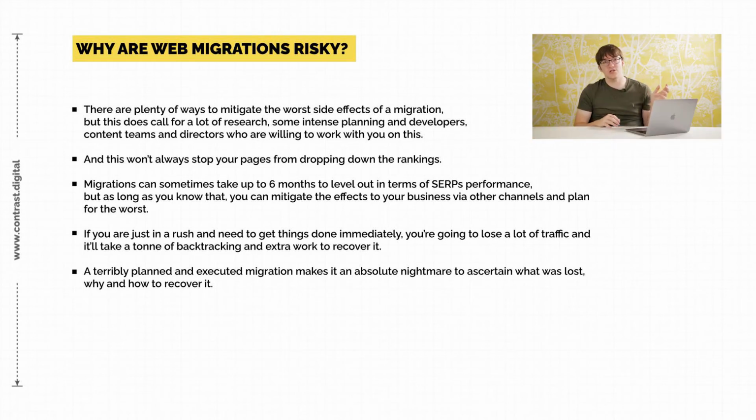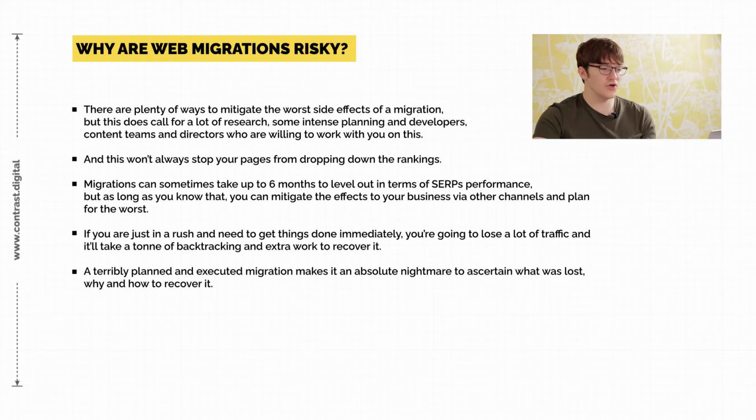We've known migrations to take 6 months plus, because there are a lot of steps and a lot of planning to make sure we get this correct. As the next 2 points allude to, if this is rushed and things aren't done correctly, you can lose a lot of traffic, and then you're backtracking, ultimately, to do a lot of extra work. You might have thought the migration was expensive, but wait till you mess it up and then have to try and recover it, with more expense, time and effort, as well as the loss of revenue you're going to have because of it.